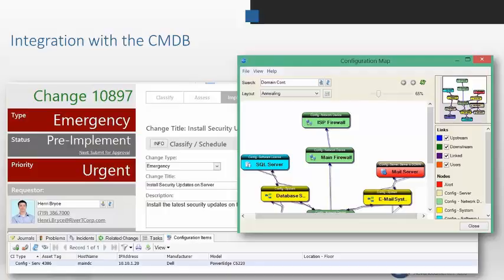And so we're often asked about, okay, I can't boil the ocean, and there's no way I'm going to be able to map all of this stuff. The strategy that most of our customers are taking at this point is to identify their key applications and key business services and the infrastructure that's core to those, and only focus on those, keeping the mappings current through change management so that you have only the important things.